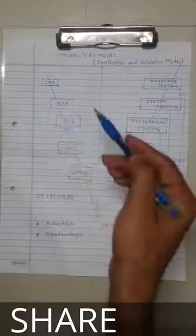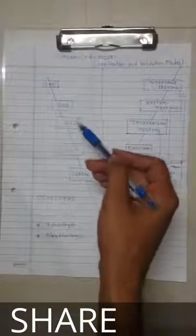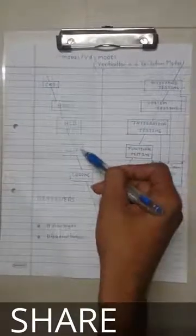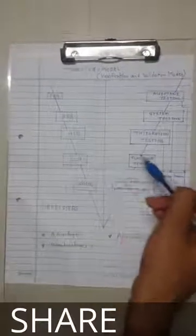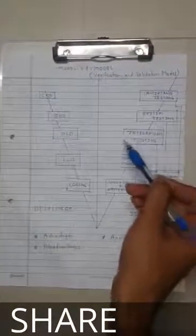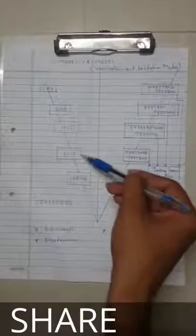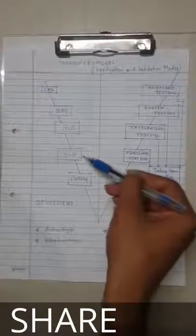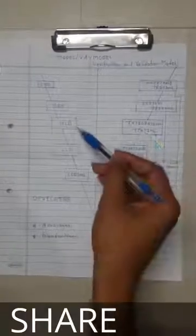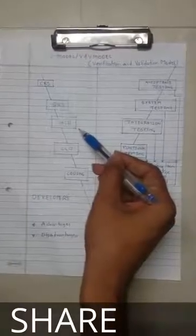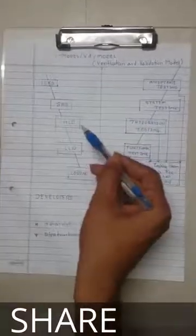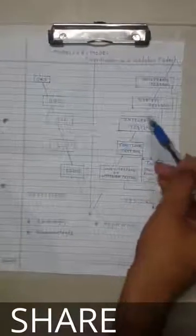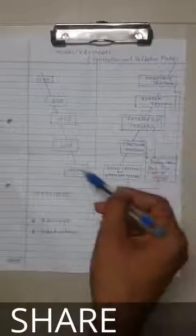In the third stage, developers start building the Low Level Design of the project. While developers are designing the Low Level Design, the testing team is testing the High Level Design. The testing team reviews the HLD and writes the integration test plan and integration test cases.